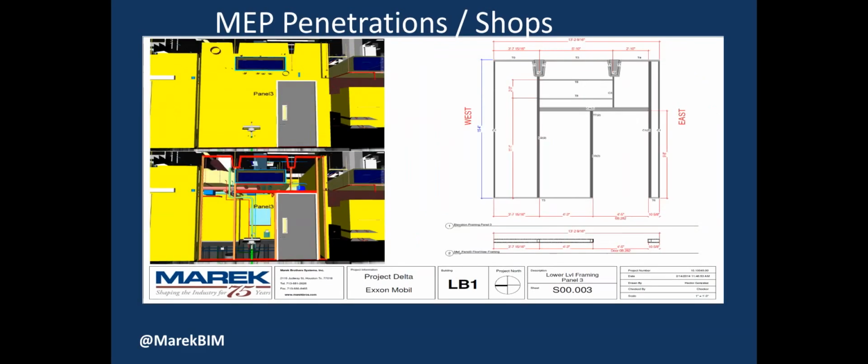More penetrations, more shops and penetrations. It just makes the job flow a little faster if we can get out in front, rather than our typical process, which is to build the wall and then go back once the MEP guys get there and reframe the opening. This keeps us from having to do extra work, and it just puts the job ahead of schedule.